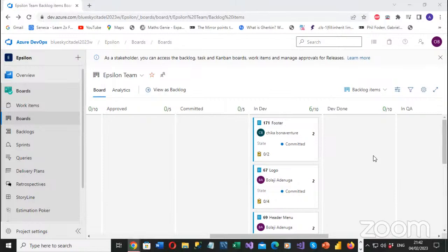The moment the Scrum Master requests, or I sent the email for sprint planning, all you need to do is communicate with the Scrum Master. I would like to create a story that I want to work on in this sprint. And that story is to set up the test framework in preparation for automation.